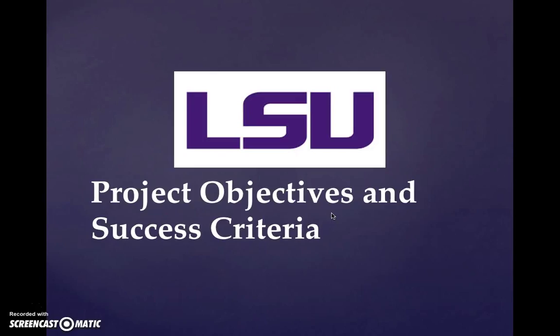Next, the project objectives and success criteria. First, we will need to collect different information on various wells in the pilot area of interest. We would like to start by comparing the initial production of the first 90 days and cumulative production after a year, since the majority of the natural gas in a well is produced during the first 1 or 2 years.